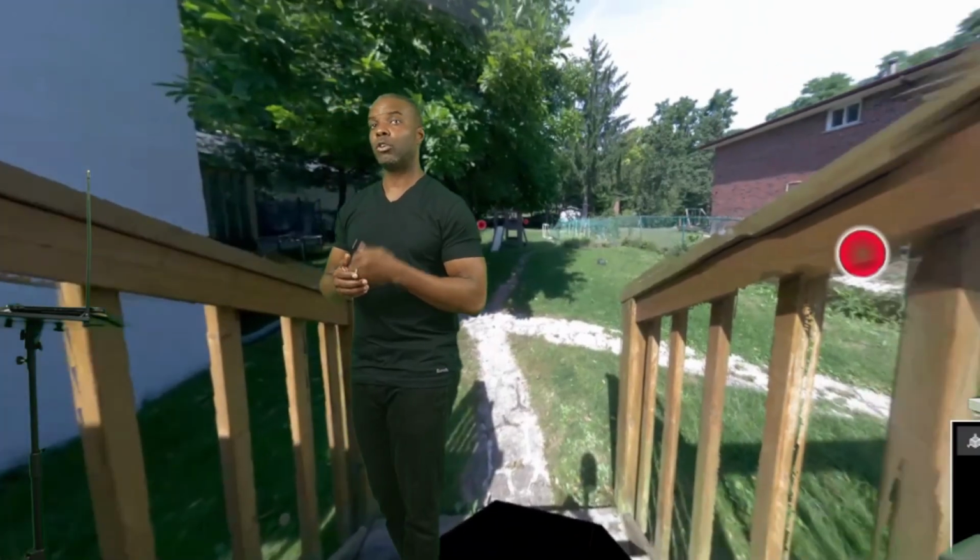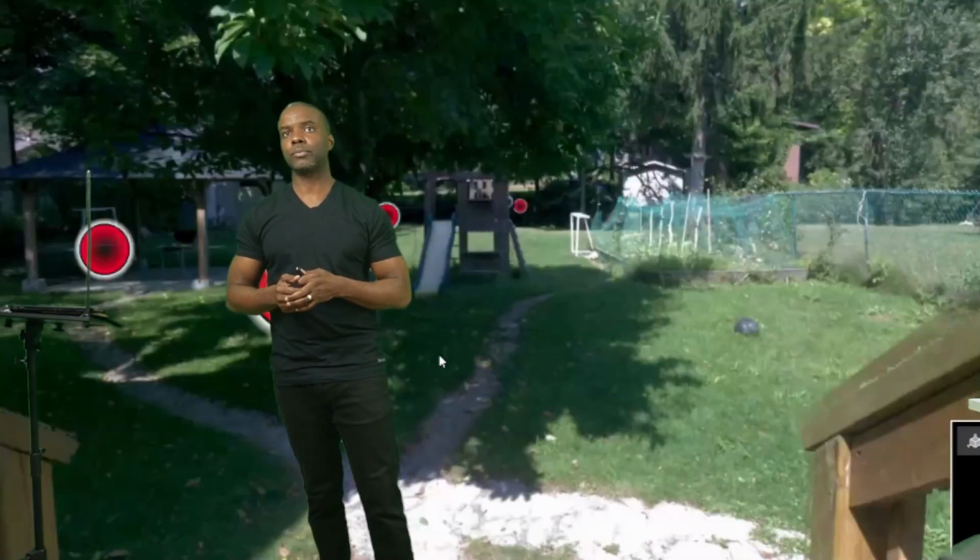This was quite helpful because the TRCA, rather than making that project a robust approval, decided to utilize our 3D scan to identify what is called a top of slope, and they didn't have to send someone out to site. That was helpful because sending a geotechnical technician out to site would have cost the client more. This saved them a little bit, and also compressed the timeline. So that was very important.